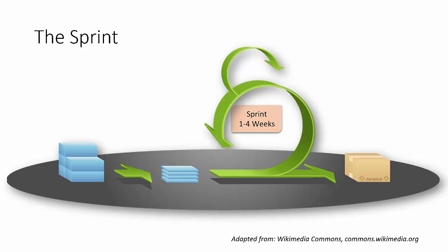During this burst of work, we have different aspects. First of all, we have different roles, different people involved. The product owner is the person who is in touch with the customer, who's in touch with the business, and who knows what the customer's priorities are. The Scrum Master is the person who knows the Scrum process well and is supporting the team in order to eliminate bottlenecks and to help them go through the Scrum process efficiently. The developer team is the team of people who are actually doing the work. These are the people who are actually creating the value directly for the customer.